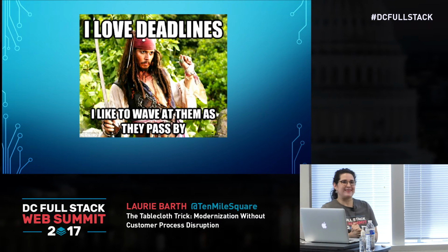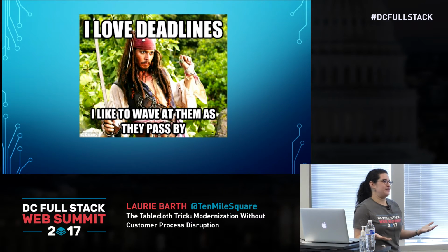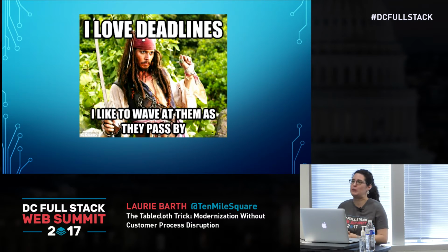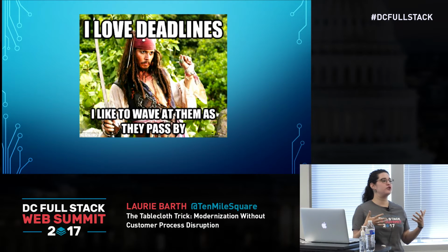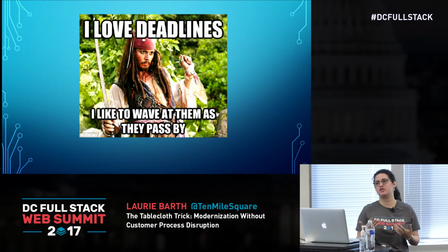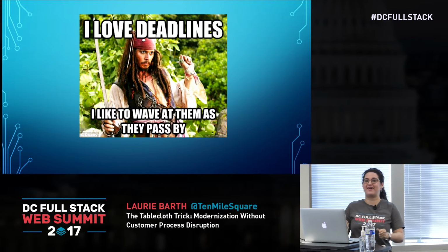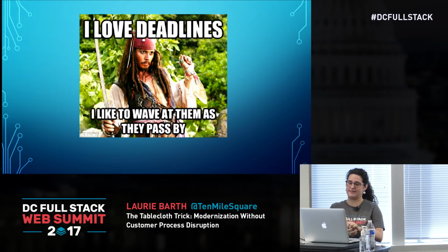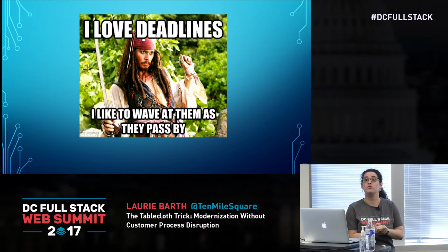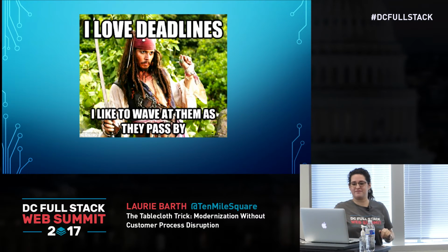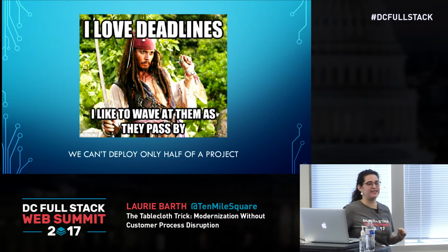Well, that was all well and good. It's an internal system, it's in use, we can keep using the legacy system. Well, not so much. In this case, there was an internal project that the system was supposed to be used for, and the legacy system was primed for each of these projects throughout the years, 2 months in advance. We didn't do that because, well, the new system's coming online and this will make sure it gets done. Yeah, don't do that. You can't deploy half a project.